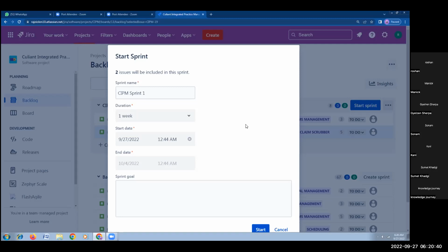If not, normally there are two conditions we have to see. If everything goes fine, okay. But for example, if we haven't got any commonality among the team, what do we do? Whichever is the highest number in all three rounds, for example, 8 is the highest number we have got a couple of times, so 8 will be allotted for the particular issue. That's how story point estimation is generally given. This is for the question asked by Anupam.